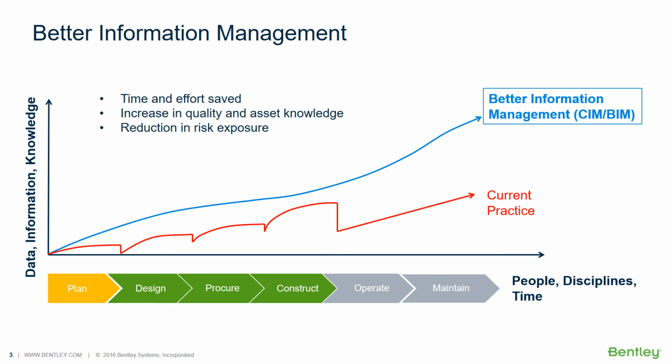Then once we get to the procurement stage, once again, we've got these elaborate designs, and they're calling for a lot of different types of materials and supplies, and the procurement department, once again, has to go back and take the designs and look at them and say, oh, we need so much rebar, we need this amount of concrete. And again, we're going to have to go back and take the design and convert it to Excel spreadsheets, databases. And in every single one of these phases, there's this gap that occurs.